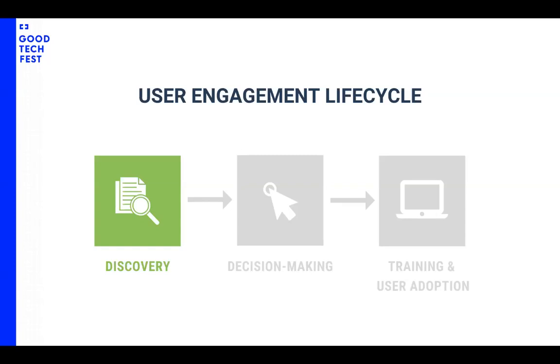So we also had discovery meetings with our program staff and also country leadership teams. So in the end, we had a shared understanding of what was expected of the project, and a shared vision of our M&E system, which was important for everybody to feel they were part of the process, and that feeling of ownership. And when it came to defining the requirements for development, it was also much easier for us.